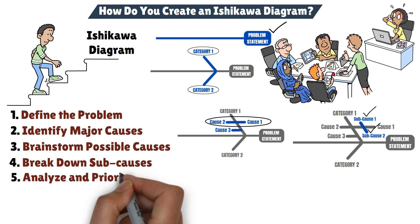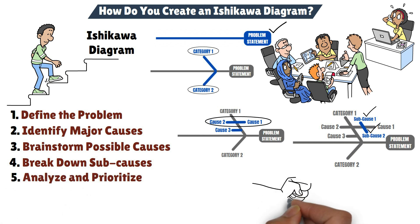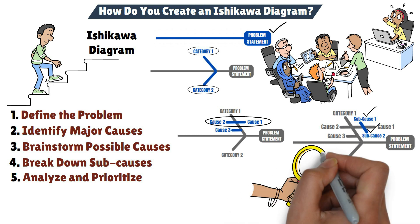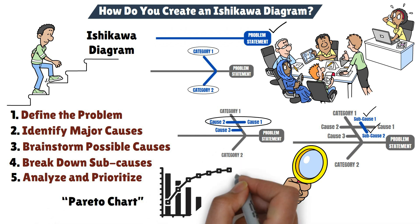Step 5: Analyze and prioritize. Once your diagram is complete, it's time to analyze it. Look for the most likely root causes contributing to the problem. While the Ishikawa diagram helps identify potential causes, it doesn't prioritize them, so further analysis may be needed. You can use tools like a Pareto chart to determine which causes to address first.